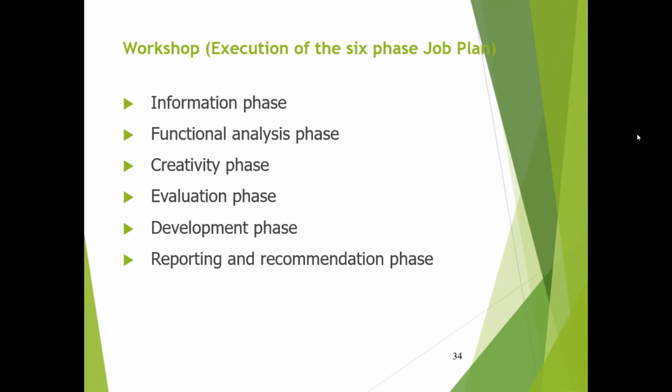And based on that, we can choose a few options as most feasible. And for those options, we can go for detailed evaluation. So that happens during the development phase. So we do the further development, or detailed, in-depth evaluation of the selected few solutions. Okay.